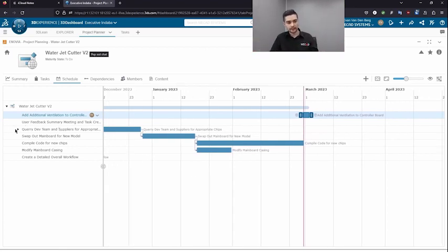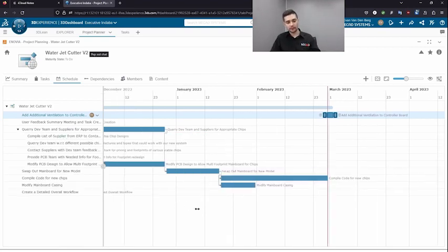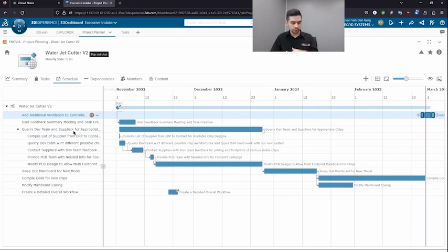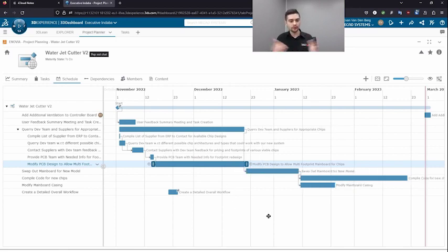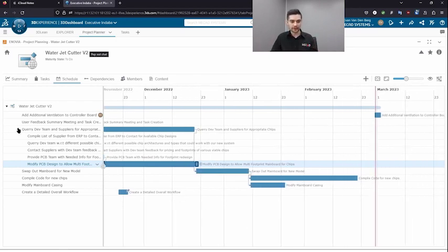And you'll see that updates and shifts to the end, and it actually adjusts the length of the total project based on that. Now, I mentioned we can have sub-projects and what we call sub-tasks. So there you see a big example of that. And what's nice is, in order to make a task shorter or longer or adjust its estimation, you can just drag the task smaller and it'll set the end date for that task automatically for you, and the rest of the things update with that.